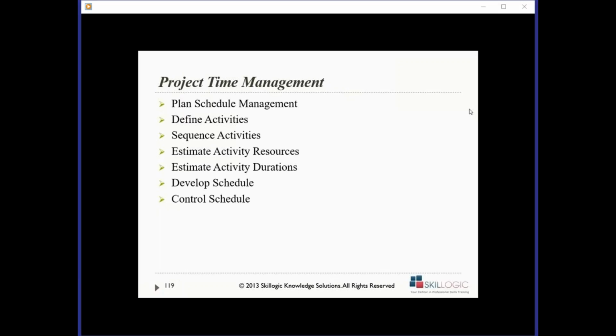Plan for the work package which you're going to do now, plan for it in detail, and you have already done the high-level planning of the other work packages, so don't plan them at the moment. When we reach there, we will plan for them. This is called rolling wave planning. How would you do it?